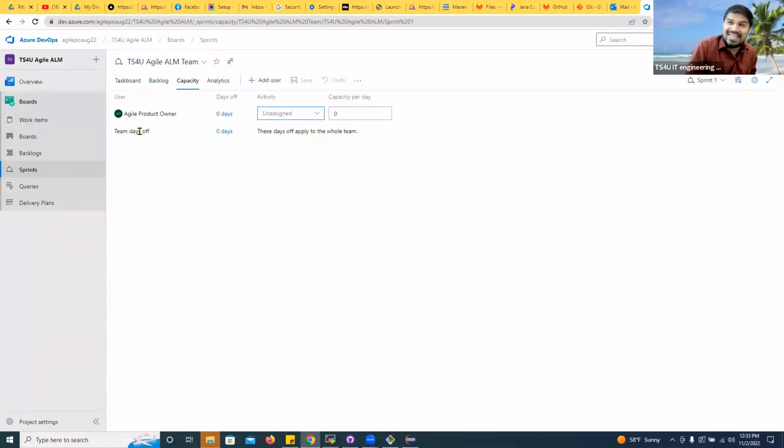One user story does not take 80 hours, or maybe then this user story has to be reduced. So the burn down helps. What do you do? If you do tomorrow the test case, 5 hours, you have to reduce from 80 to 5 hours. Day after tomorrow, you did the test data, 8 hours. So from 75, 8 hours will be reduced, 67. So that's what the burn down means. From total hours, your consumed hours will be reduced and the remaining hours will be displaying in your chart.